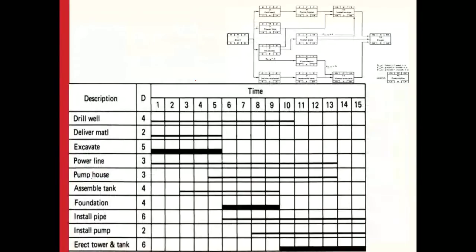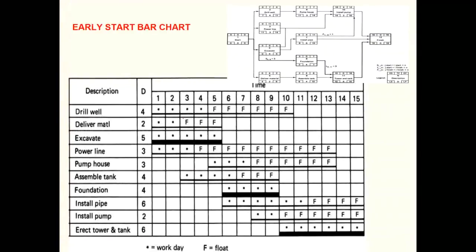And this subsequent task involved students using this Gantt chart to load it with the resources. So different activities involve different types of resources. Now here in this bar chart, you can see the solid lines indicate the activities which are critical, whereas other activities shown in a slightly thinner way are non-critical.